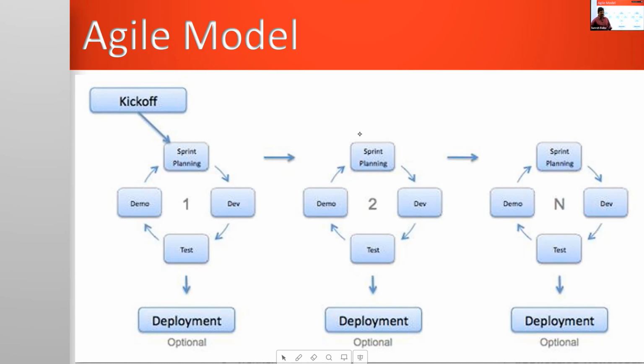Whereas in agile model, totally 40 are to be implemented, agree. This will be split into multiple phases, not 3 months of schedule, 1 week of schedule, maximum 10 days of schedule. Test match schedule is about 5 days, T20 schedule about 4 hours. Rather than making a lengthy schedule, make short schedules, 1 week or 10 days, not more than that. Consider 2-3 major business requirements to implement in one short schedule.